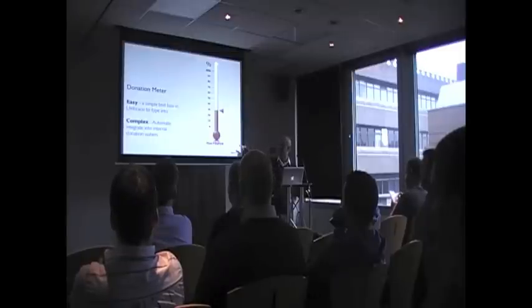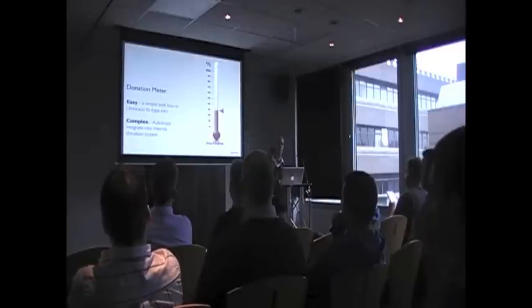They wanted a donation tool on the front of the website, so an easy way of doing that is to have an Umbraco form with a text box. You type a number in, you hit publish, it updates the animation on the site. In Umbraco world, that's half a day, a day's worth of work, 2 days tops with a bit of design.